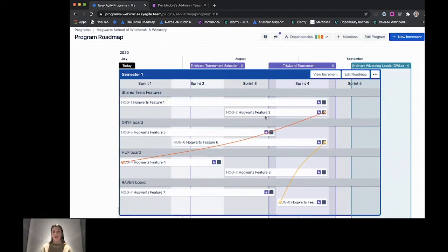And lastly, what you can see on your screen here is we're able to identify any dependencies that exist between features on our roadmap. And I'm going to touch on what the colors of those lines mean a little bit later in the demo. But that kind of brings us to PI planning agenda item number 1, which is setting of the business context. In a physical PI planning session, this might look like a business owner standing in front of a room of up to 150 members of the release train with a face-to-face communication style, where they might be going through a presentation, for example.